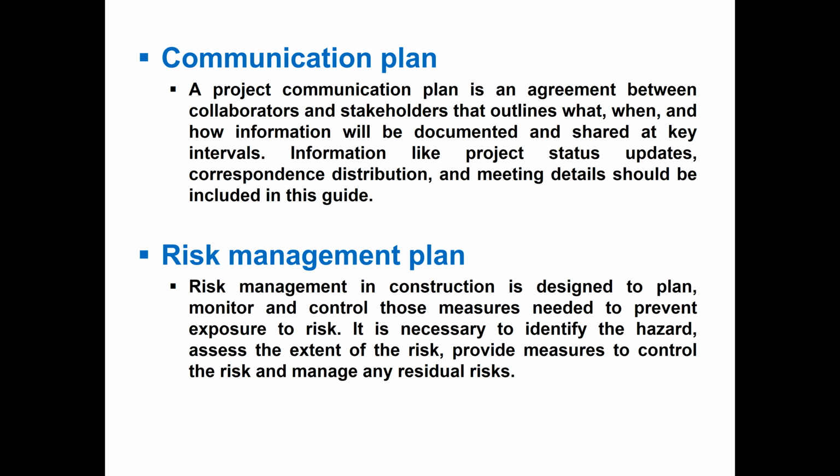So next we are going to discuss a little about the communication plan. Communication plan, like who are our stakeholders within the project, how will be our communication within the project, how we will distribute copies or approval process of materials, and how we will maintain those documentation and meeting records. So all these things, like at what interval we have to report status of the project, like progress reports. So it's all how the written communication will be linked between the stakeholders, with the owner, with the consultant, and within our organization, if it's the organization of the contractor.